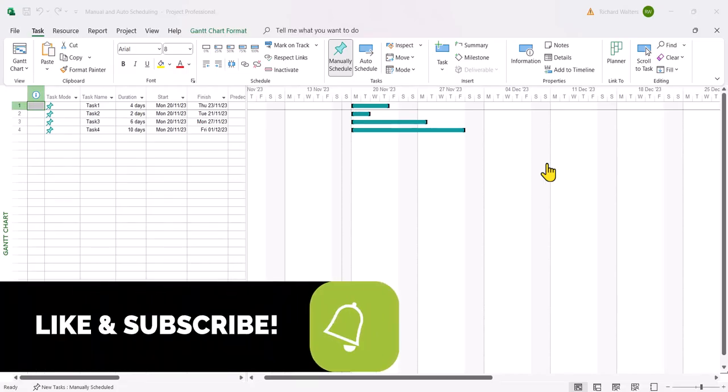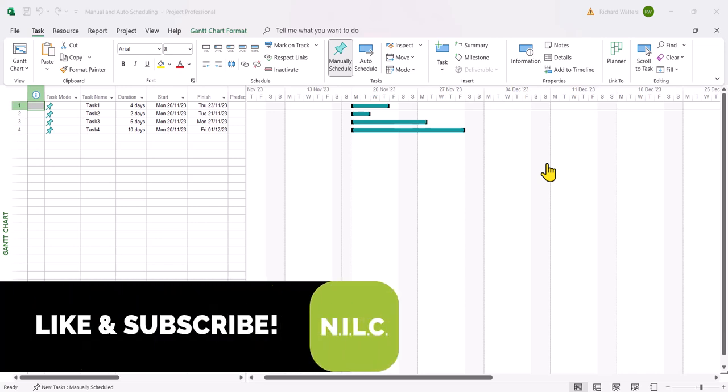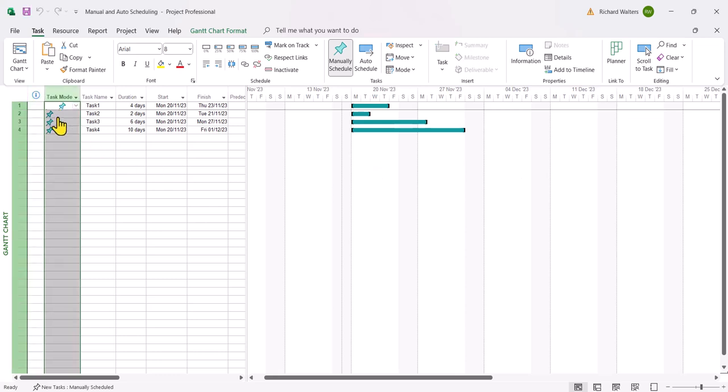In this demonstration we're going to look at manual and auto scheduling tasks. Now the default of Microsoft Project is what's called manual scheduling. This little light blue pin symbol indicates manual scheduling. This is the default of Microsoft Project.